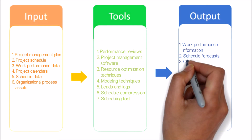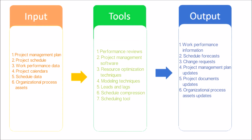Now let's see the output of this process. Work Performance Information: The calculated SV and SPI time performance indicators for WBS components, in particular the work packages and control accounts, are documented and communicated to stakeholders. Schedule Forecasts: Schedule Forecasts are estimates or predictions of conditions and events in the project's future based on information and knowledge available at the time of the forecast. Additional outputs include Change Requests, Project Management Plan Updates, Project Documents Updates, and Organizational Process Assets Updates.